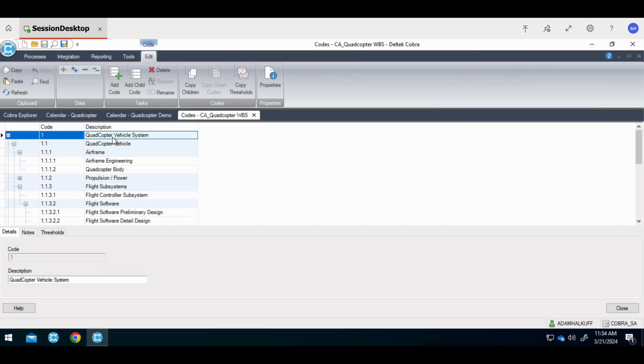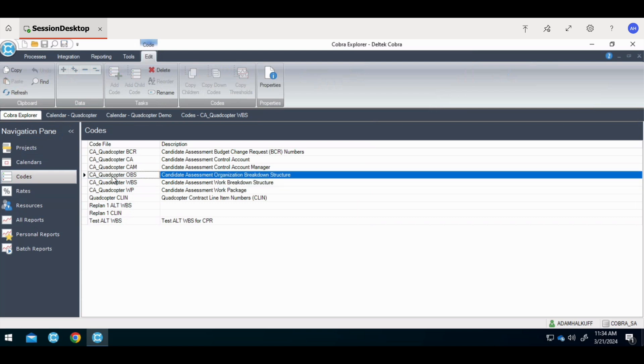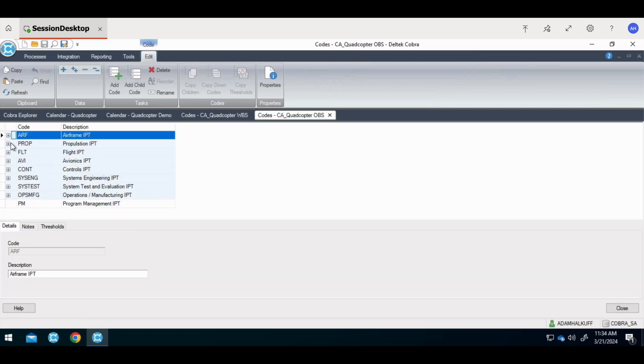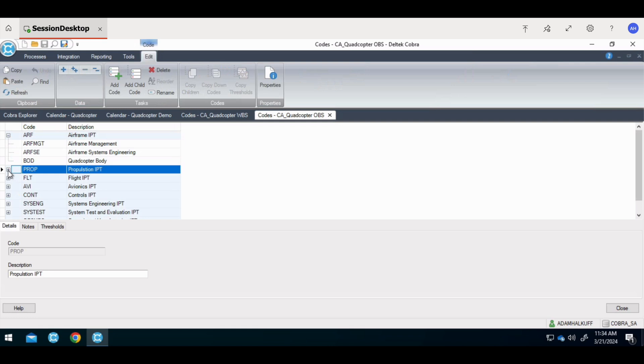It's not just the WBS that could be set up in a hierarchical structure. The OBS can as well. Here we have it broken out into lower structures as well. So you can roll up from the lower level right to the higher level OBS.